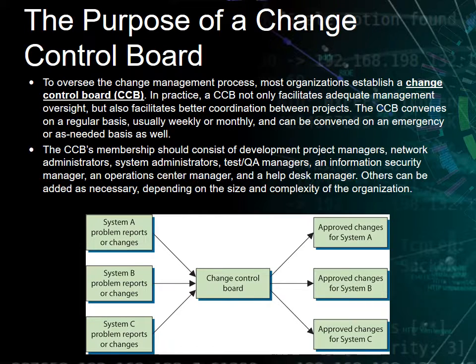The CCB membership should consist of development project managers, network administrators, system administrators, test QA managers, an information security manager, an operations center manager, and a help desk manager. Others can be added as necessary depending on the size and complexity of the organization.